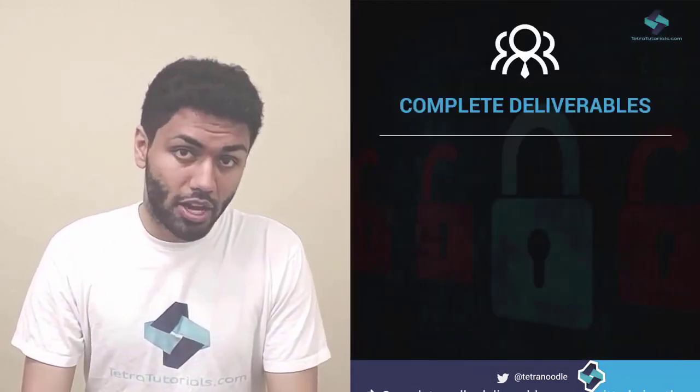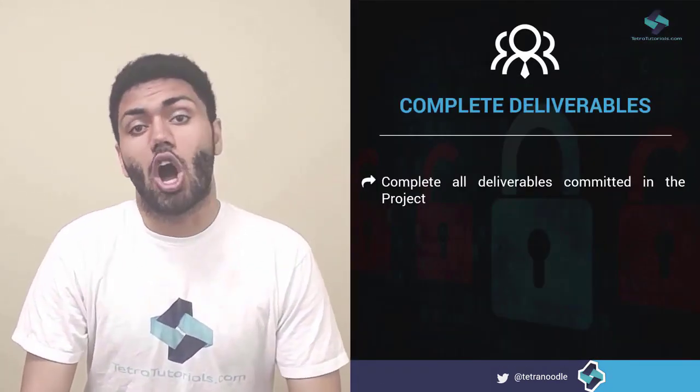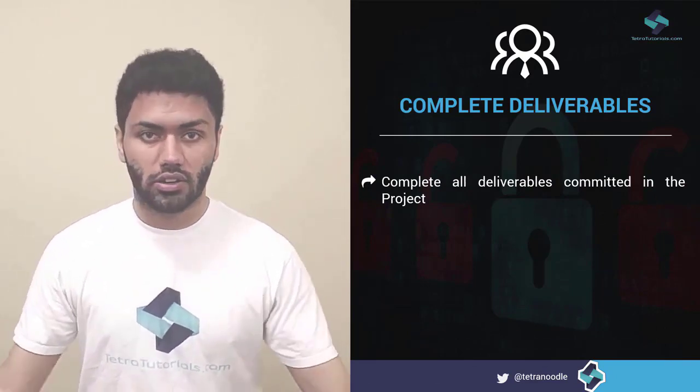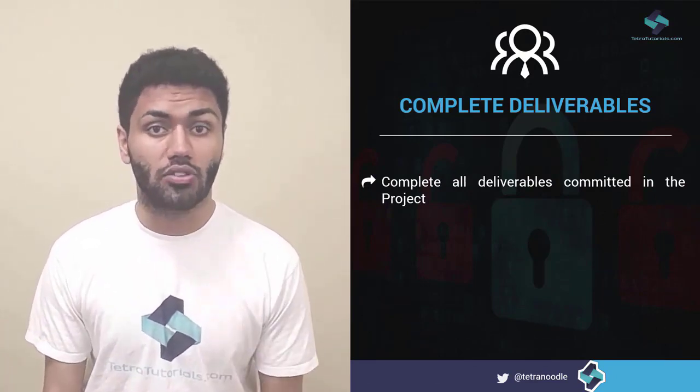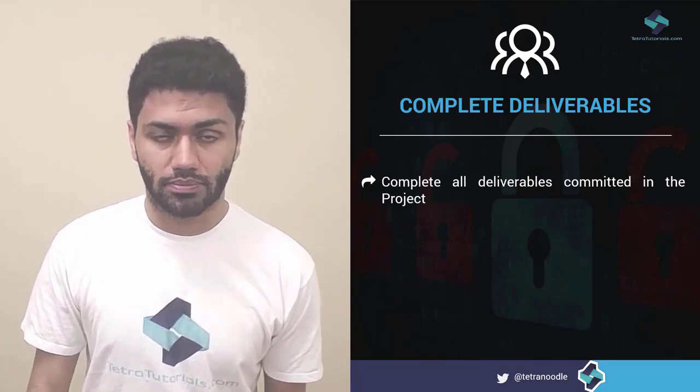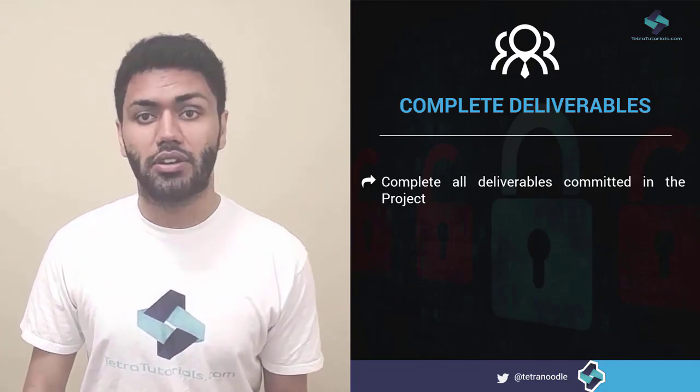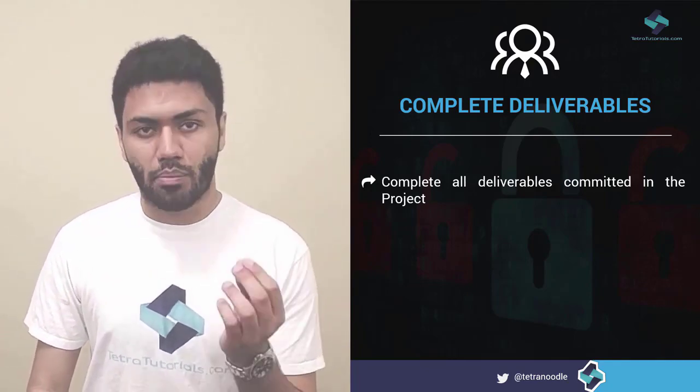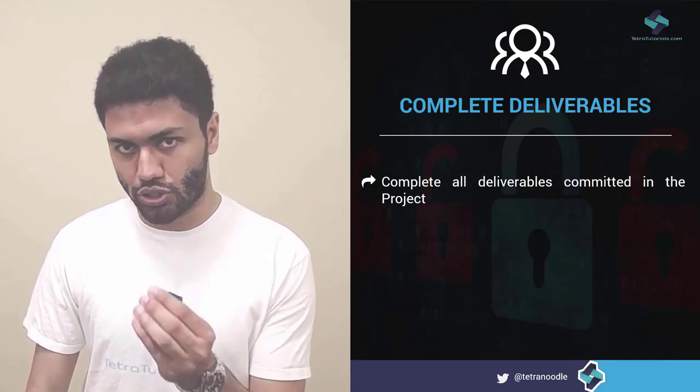Usually, the project manager checks the project contract to check if all the deliverables mentioned as part of the contract have been delivered or not. It's essential that all the committed deliverables are completed for a project to move to the closure stage.